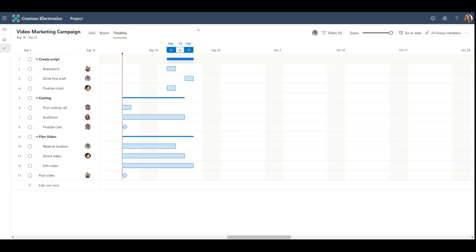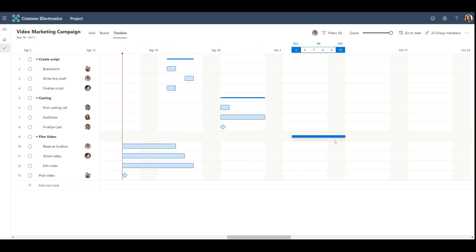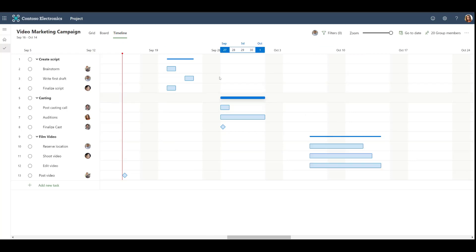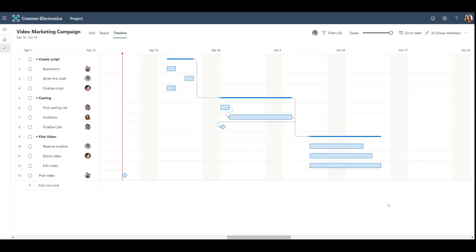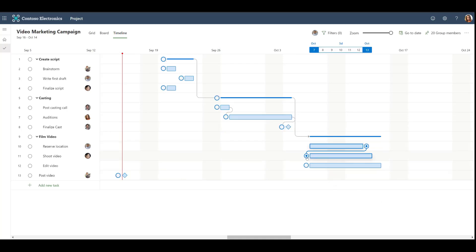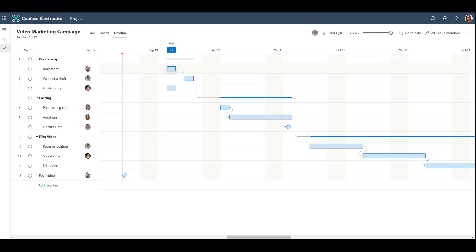Now, let's check out the timeline view in Microsoft Project. The timeline view is a Gantt chart that shows us when our tasks will occur. We can adjust our schedule by dragging and dropping the tasks in this view. Additionally, we can add dependencies between our tasks in the timeline view by dragging and dropping link lines between the tasks. Microsoft Project will automatically reschedule your tasks according to the dependencies that you create.